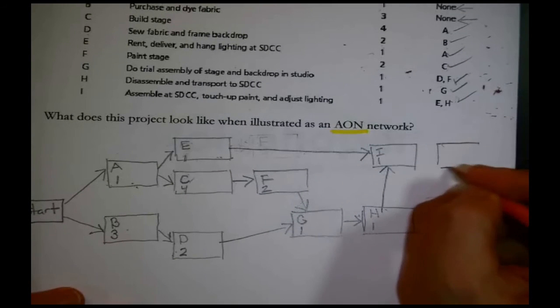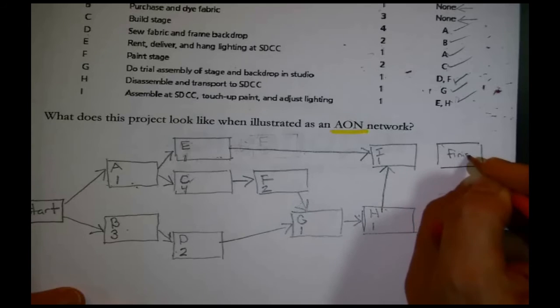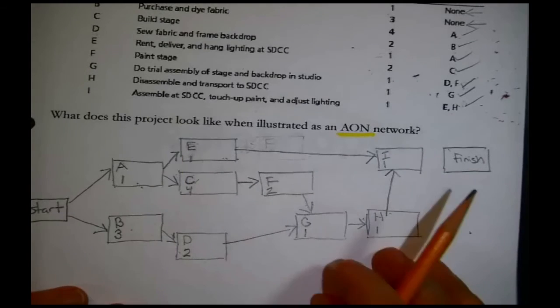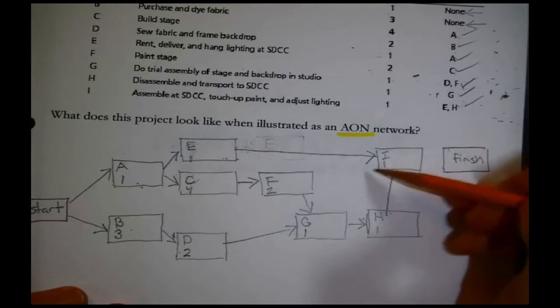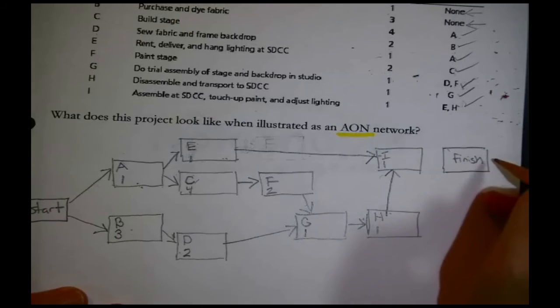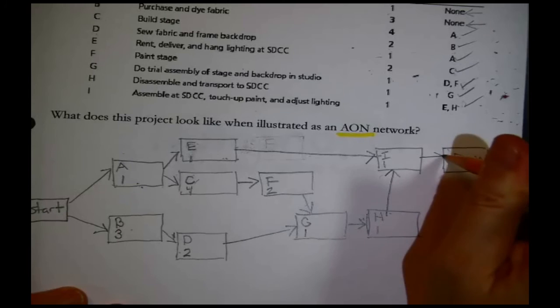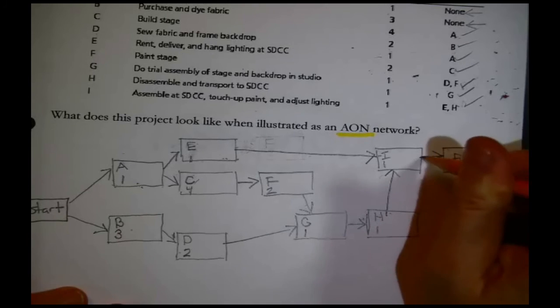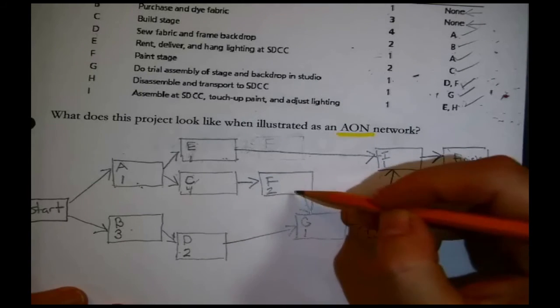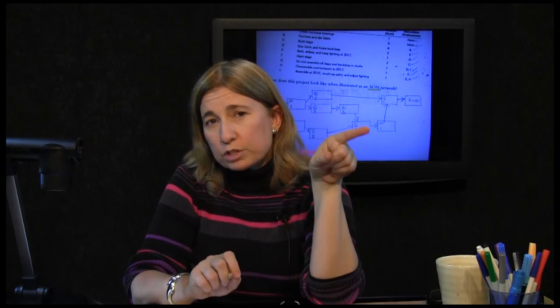And we want to connect every node, every square, if you will, every task that has arrows pointing at it, but no arrows leading away from it. So I is obviously something that occurs at the finish because it fits that description. Everything else, I think if you do a check, will have arrows pointing at it, but also there's another way to think about it: you're checking that in each case, if you go into a box, there's a way to escape it. If there's not a way to escape it, then connect it to the finish.